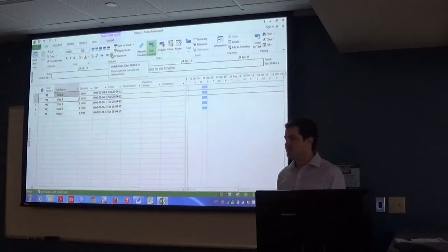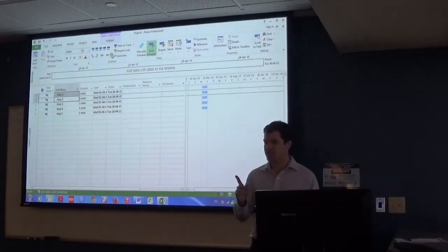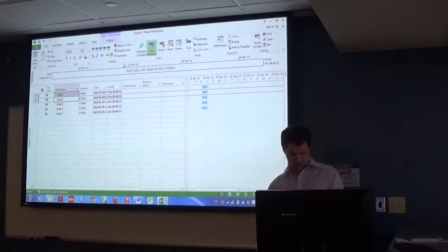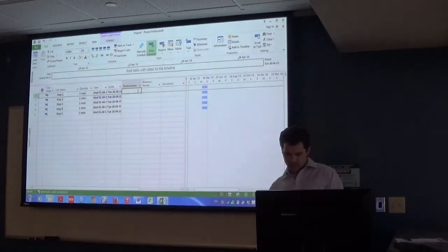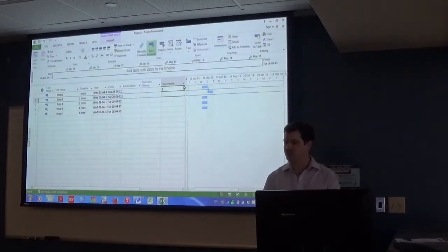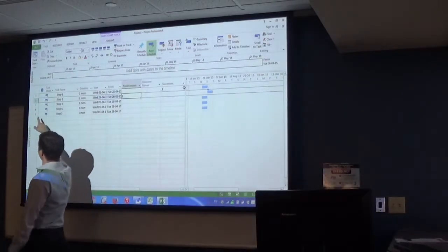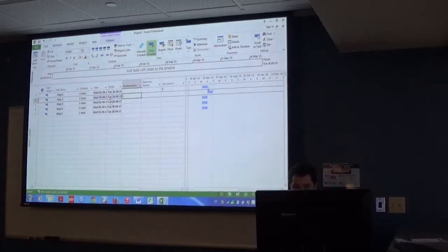Is there a way, like in predecessors, just to say, hey, step 2 is linked to step 1? Yeah, absolutely. So that's a way to do it without going into the task information tab. So that's a great question. So let's say that my successor on this is 2. Same thing there. Okay, so you're just putting the number of that. Yeah, so you're defining these tasks, they each are assigned a number. Okay, cool. So it'd be the same thing.